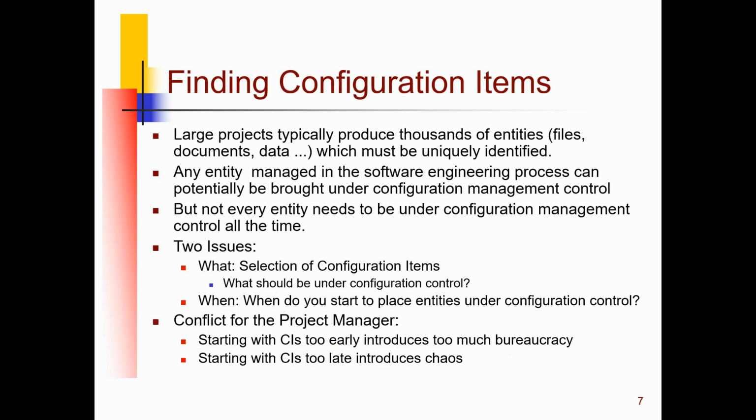When a document is produced, you may think that we put it immediately into configuration control. That's not true. When a document is produced, later, sometime in the future, when collaboration is necessary and you expect a lot of changes on this document, and these changes must be under control, then you put it into configuration management.